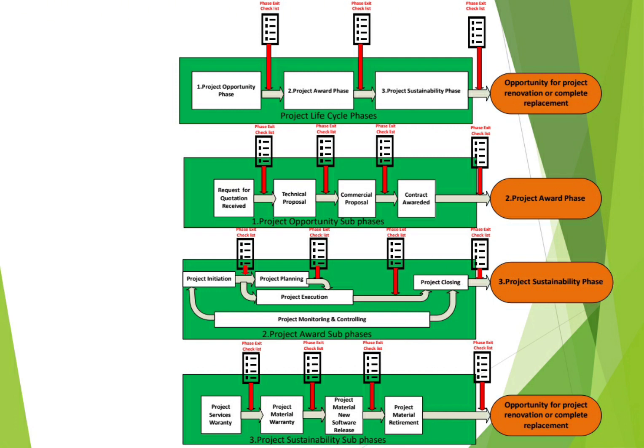So how is the cost segregated? Sure, it is the man hours of your team. These hours are converted to money. Finally, the material you are going to purchase, and if there is manufacturing, this will also be cost.